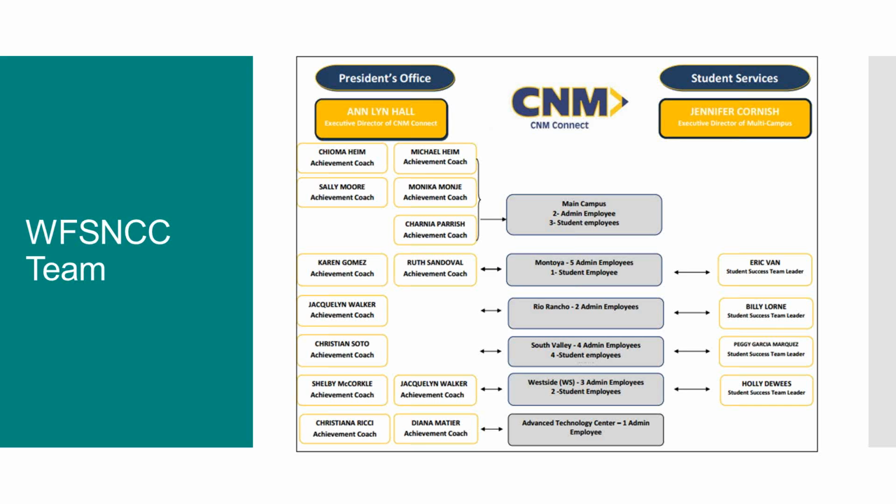We also want you to provide a project management plan for meetings. So we would like to know the frequency of meetings that your team will have, who's going to participate, and how you intend to report out to your leadership. And then just more logistically, we're looking for the staff contact information so that we can assure that, for webinars like this nature, everyone is getting that information.